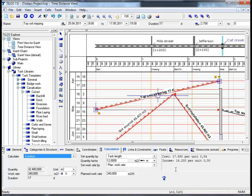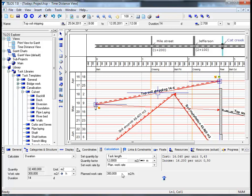The question we need to ask ourselves is what do we need to do to optimize our income, to earn money as opposed to losing money. If we go to the planned work rate field and change this to 300 square meters per hour and hit the return button we can now see that we have a different cost structure.